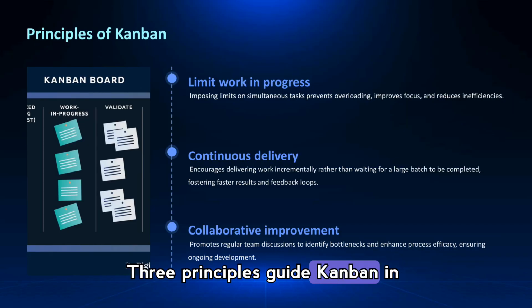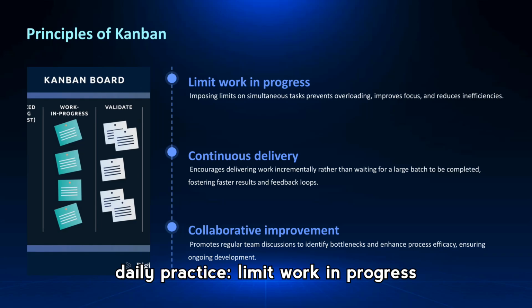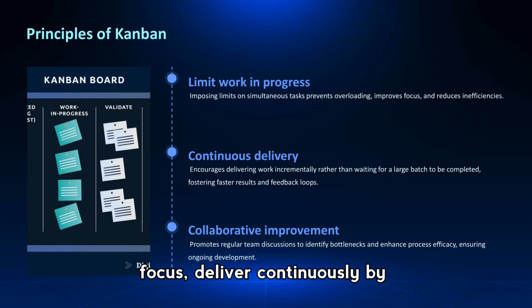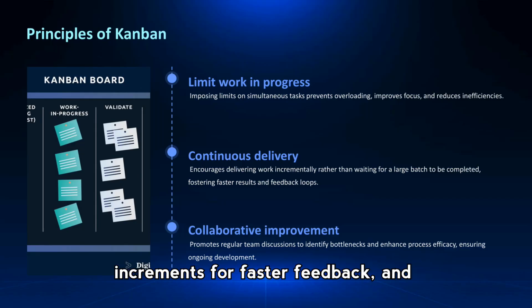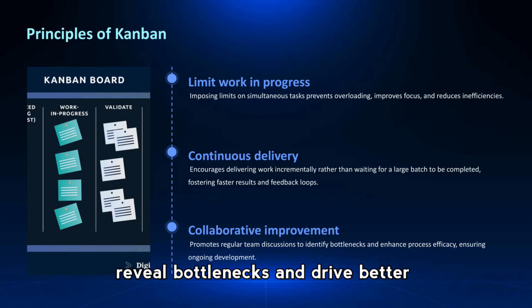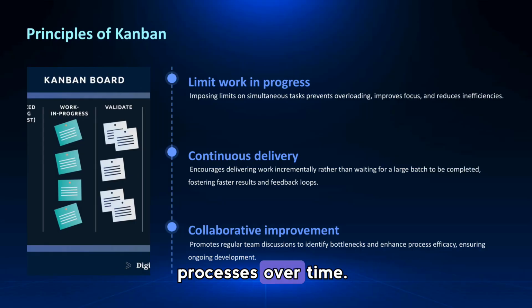Three principles guide Kanban in daily practice. Limit work in progress to avoid overload and improve focus. Deliver continuously by breaking work into smaller increments for faster feedback, and pursue collaborative improvement through regular discussions that reveal bottlenecks and drive better processes over time.